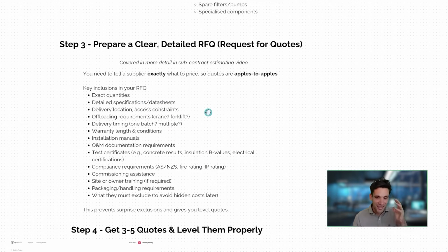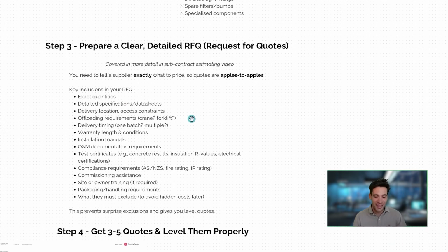Don't rely on the supplier to do the bill of materials. I think that is just going to create you problems down the line, particularly if they're just quoting for a tender and they know you haven't secured the project. Give them detailed specifications and data sheets, or if you need to get their product approved for compliance, you would need to request that from them.